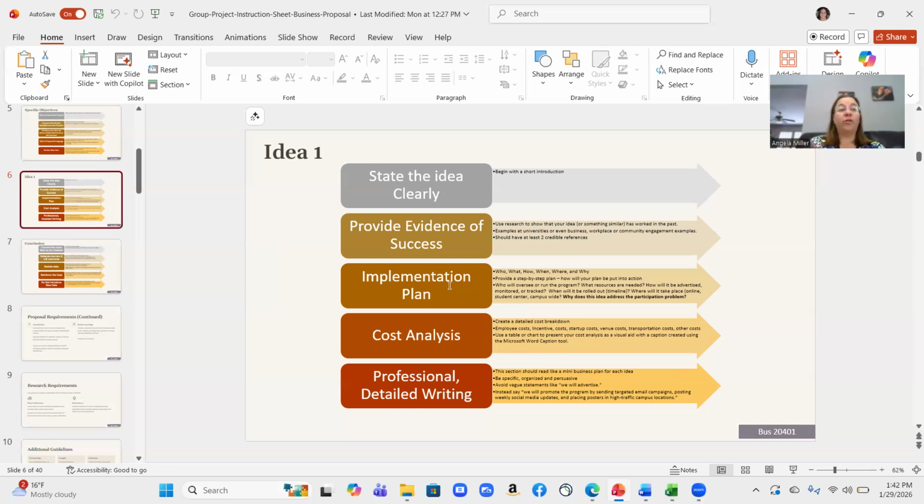Then you need to go even further and you need to think about, okay, where are we getting the headphones? How are they getting delivered? Who has to be here to receive them when they get delivered? How early do we need to deliver them? That's the timeline aspect, right? What condition do they have to be in when we return them? What timeline do they have to be returned in? Do we have to have a professional that runs the DJ in order to make this happen? Right? There are so many details, and you need to think through every one of those details and make that part of your implementation plan.